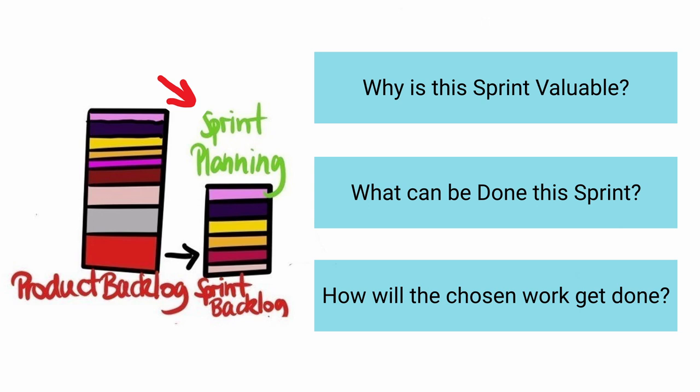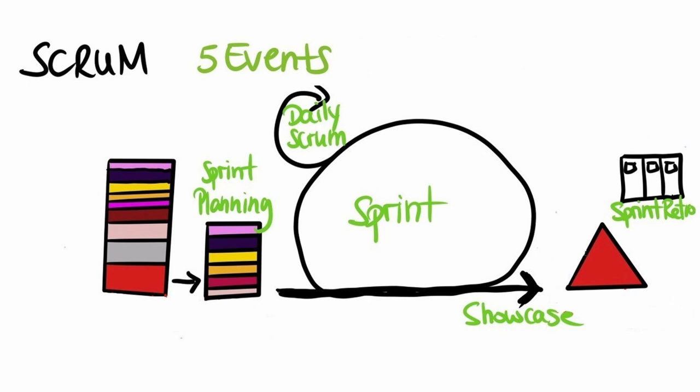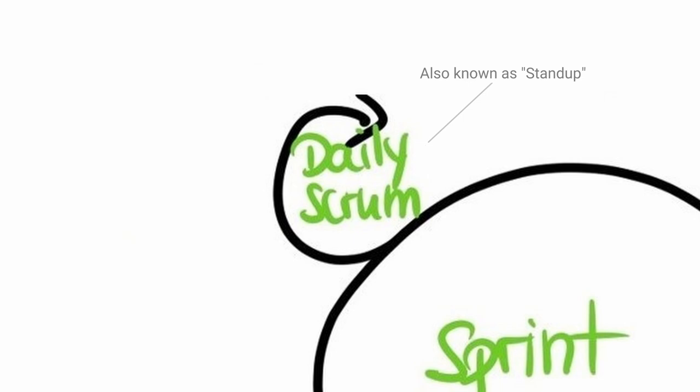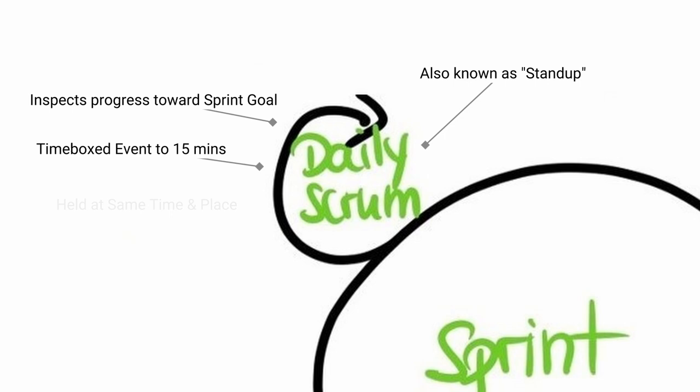Daily Scrum. The purpose of the Daily Scrum is to inspect progress towards the Sprint goal and adapt the Sprint backlog as necessary, adjusting the upcoming planned work. It is a time-boxed event, ideally 15 minutes, held at the same time and place to reduce complexity. Daily Scrums improve communication, identify impediments and promote quick decision making. This is the team's meeting and should not be seen as a status report to management.